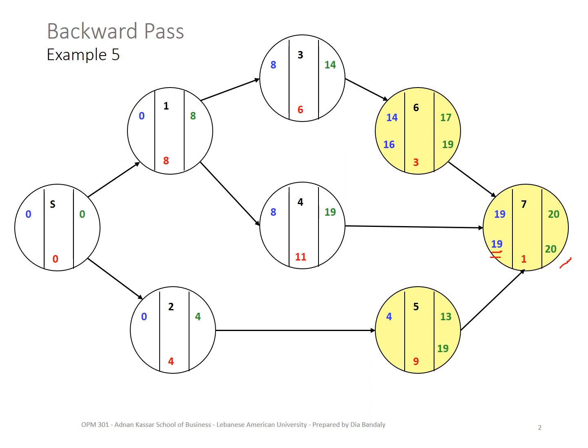I cannot allow it 20, for example, because then 7 will be delayed, but 19, right? So you can see now the amount of flexibility I'm having. It has an earliest finish of 13, but a latest finish of 19, so 6 weeks difference. We're going to talk about that 6 weeks difference later. Then the latest start, 19 minus 9, is 10.